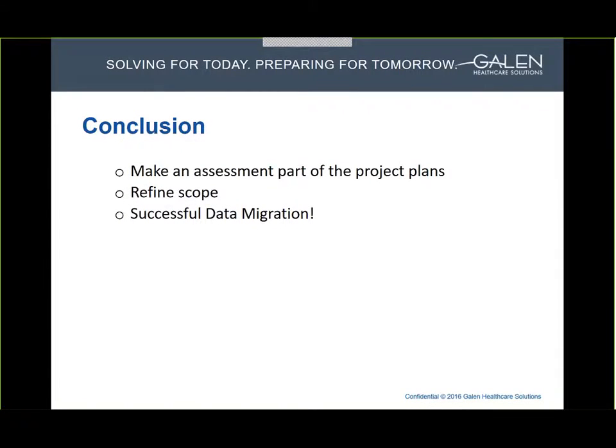So in conclusion, we'd recommend that no matter how familiar your organization is with the legacy data or the migration process, plan for an assessment. Many times an assessment is an overlooked activity and is performed too late or without the detail it deserves. Make the assessment part of the original project plans and build it into the early stages of the project. If you can perform it prior to kicking off the migration project, even better, as it will help refine scope. And ultimately, it will benefit your organization as you head down the migration path.